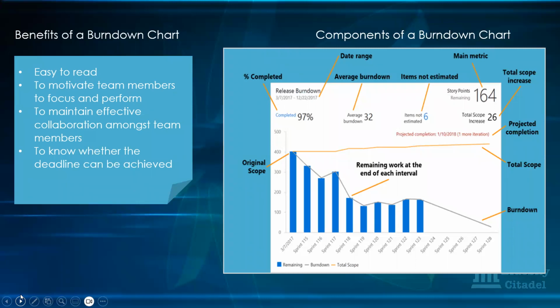Okay, so when we look at the second column on the right, we're able to see this is for a release burn-down chart. And as you can see, it totals the different sprints at the bottom. So if it's for a particular sprint, what you will be having at the bottom here will be the days of the sprint. And what you'll be having over here is the effort that has been committed to it, or the story points, the total story points that's committed during that sprint. And that reduces as you go further. If something is being done, it reduces.